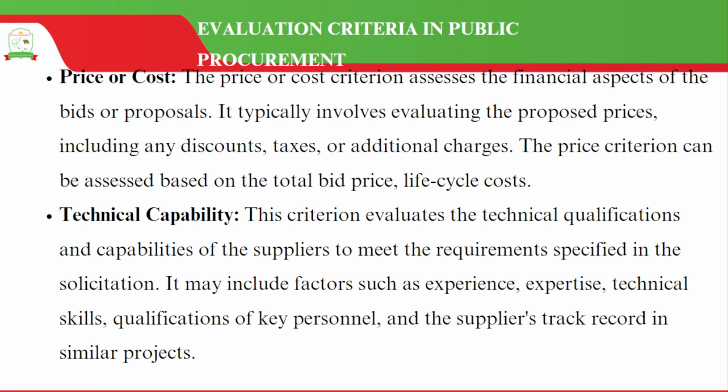We have the technical capability. When we are talking about the technical capability, we are talking about the criterion that we are going to use to evaluate the technical qualifications and capabilities of the suppliers to be able to meet the requirements specified in the solicitation. So when we are looking at the technical capabilities, we are looking at factors such as experience, expertise, technical skills, qualifications of key personnel, and the supplier's track record in similar projects.